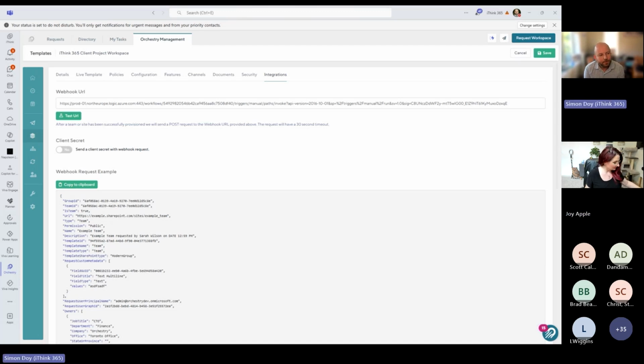Yeah, I guess the executive level view is, can I see a status of all the projects? But if you had a particular content type in your SharePoint document library, the project executive status report, whatever that might be, you could use some metadata to pull out RAG status or some key metrics. Then you could have a project hub SharePoint site and roll that information up. You could use something like the PnP search web parts to do that. I don't know if that's quite what you're thinking, Christina.